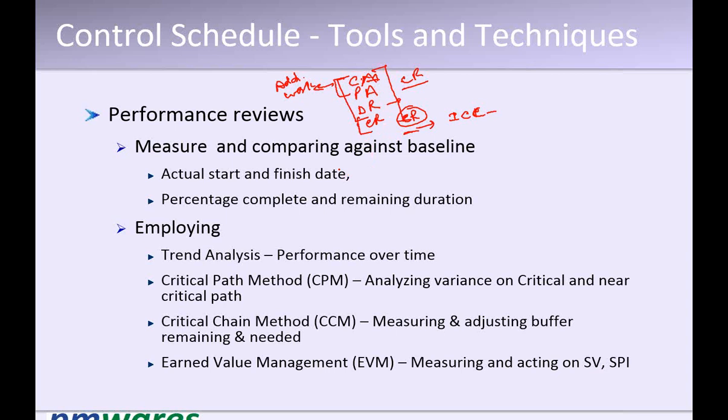This is all about the process you prepare for your projects. Yeah, for instance, in other projects, what I did was anything that requires more than 4 man hours goes to a change request. Otherwise, it does not. You can write some kind of rules. Yes.